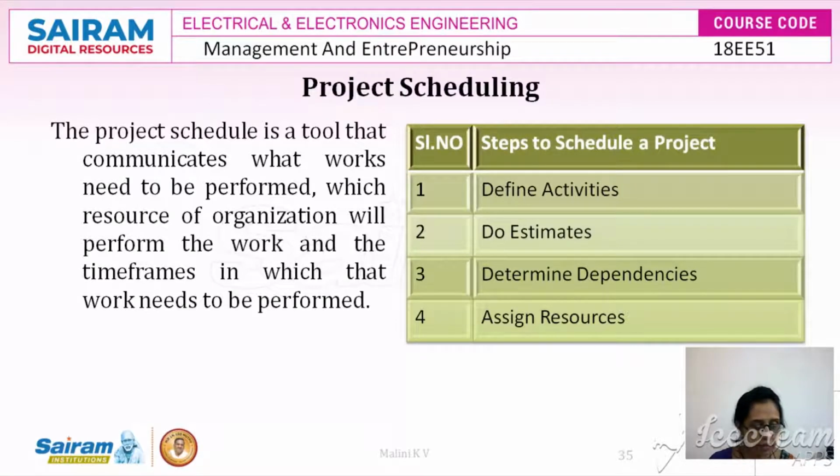And the second process is that we have to rank the candidate in the process flow. After certifying the business case, we have to rank the candidate project with respect to the target due dates, completion, the impact on the technology architecture, and also the impact on other applications, the byproducts, as well as the project size, the time, cost, and duration, and then the project risk that is involved.